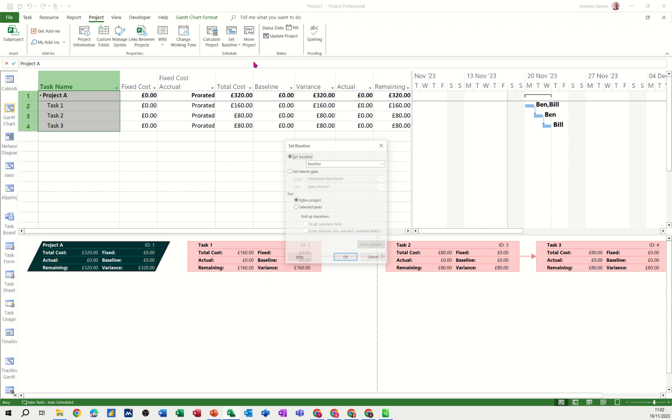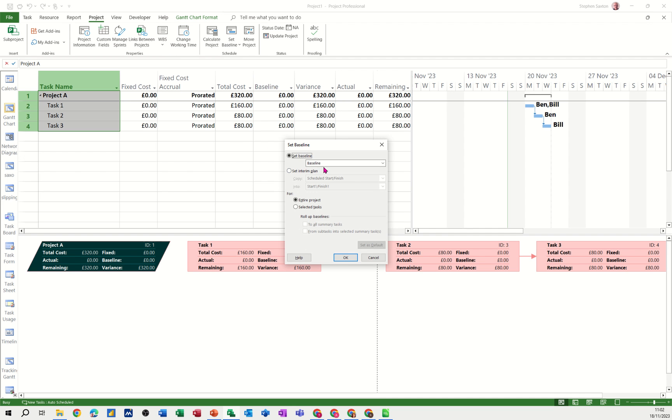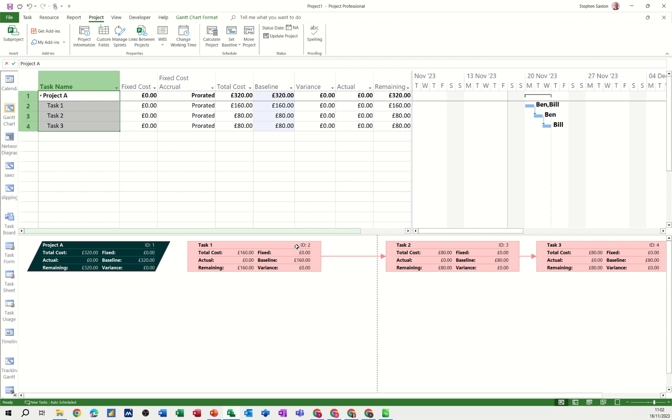So if I set baseline, baseline, OK. You see the baseline figure fill it in there and that baseline column filled in there.